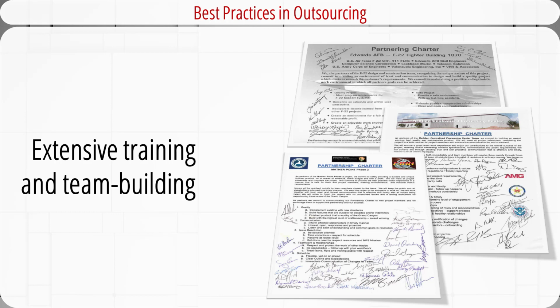This charter states their common goals for the project as well as the procedures that will be used to achieve these goals. Note that the partnering charter is different from the project charter we introduced in the previous video. The project charter is a document issued by top management authorizing the project manager to initiate and lead the project.